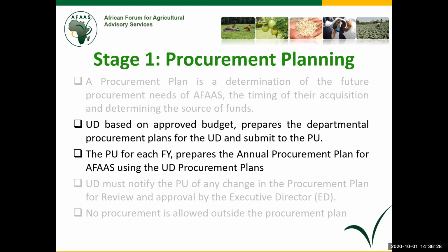So it means that in my procurement plan, it's not reflected anywhere. I can't know that you require it. But you can come out and say, within this service, I might require the following services, and it prepositions the procurement unit to say, okay, if we created maybe a long-term agreement or a framework for translation services, then the user will be able to get these services as and when he needs them.